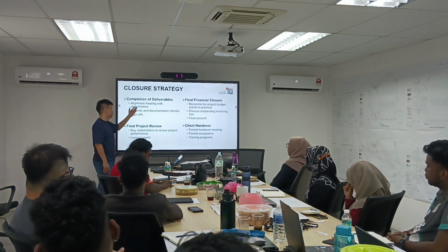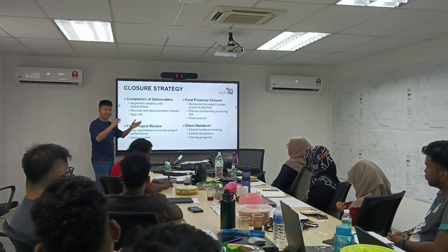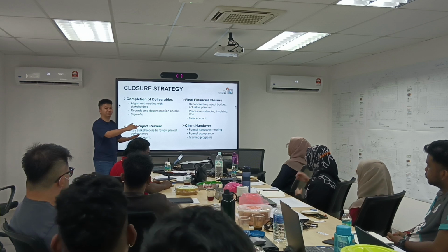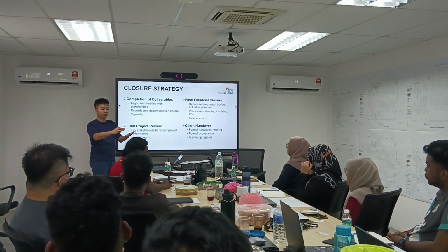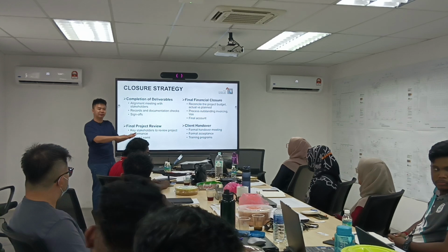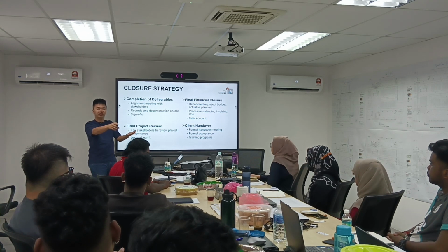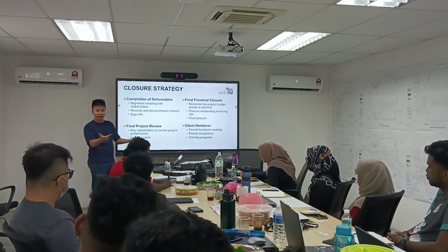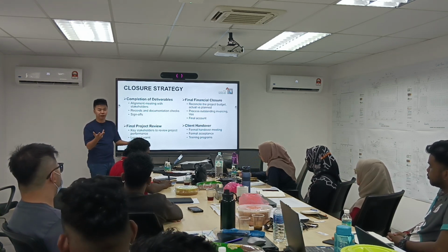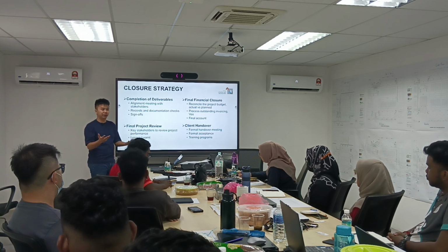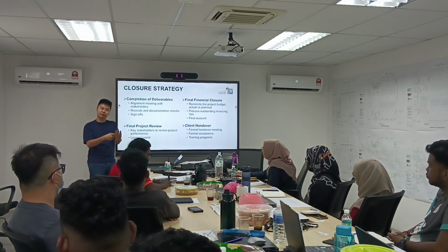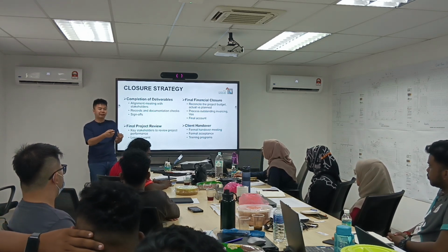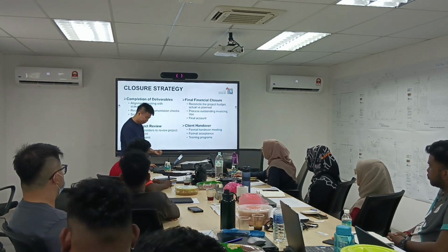Then we come up with, with all the stakeholders, an exit plan. So in order for us to exit, how many trainings do you need? We need to define that. What sort of document do I need to hand over? The T&C form, the ITPs, the system record in the Aconex drive, or in the future, the CX planner, and then all the SBU drawings, all the O&M, all the keys to every room in the building, all the access cards to every room in the building, all the system passwords like your CCTV system, your BMS system, your CPOS system, and then your ITMP for your air conditioning as well.